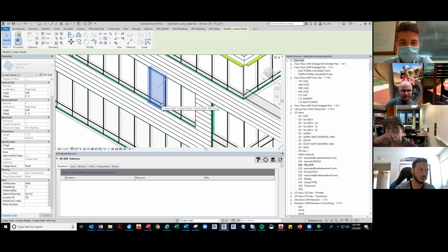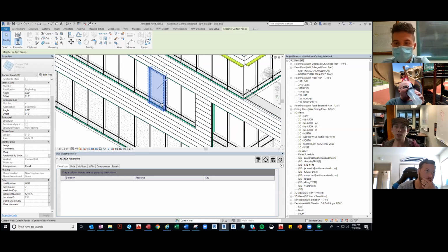So how the shop works is they break down the whole building into digestible chunks in weekly releases. Say maybe for this job they break it down into 10 weeks, and then how many units they want to assemble each week. Or they look at how many total units are in the whole building, and then work backwards from there. And then they decipher how many weeks they have.